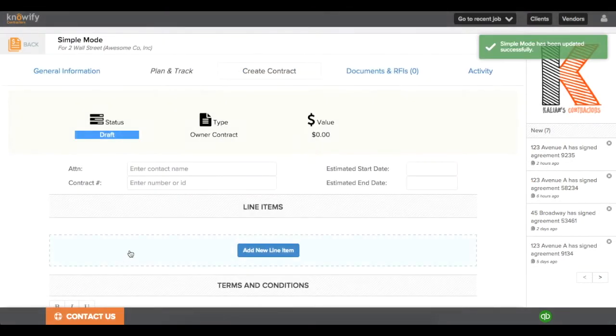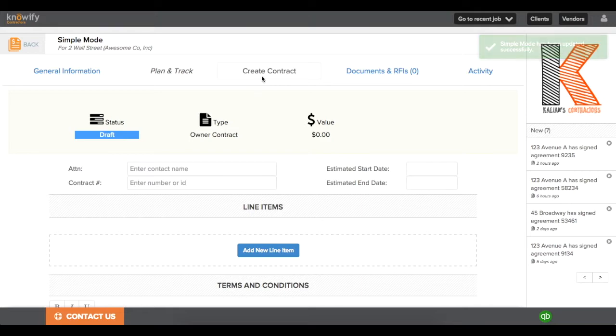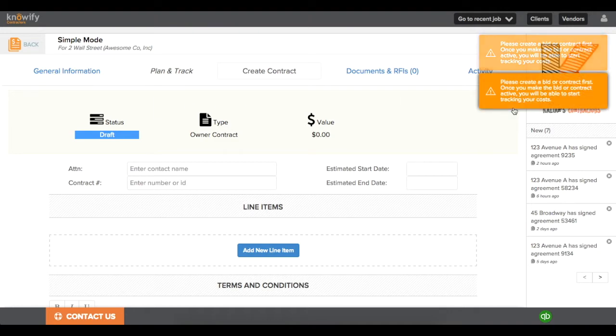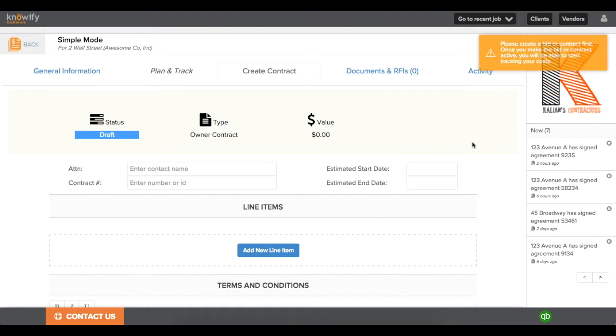First, we'll cover simple mode. You'll see that when I save this job, it pulls me into the Create Contract screen. The Plan and Track section is actually disabled until the contract's live, so you can't track any costs to the job until the job is active.